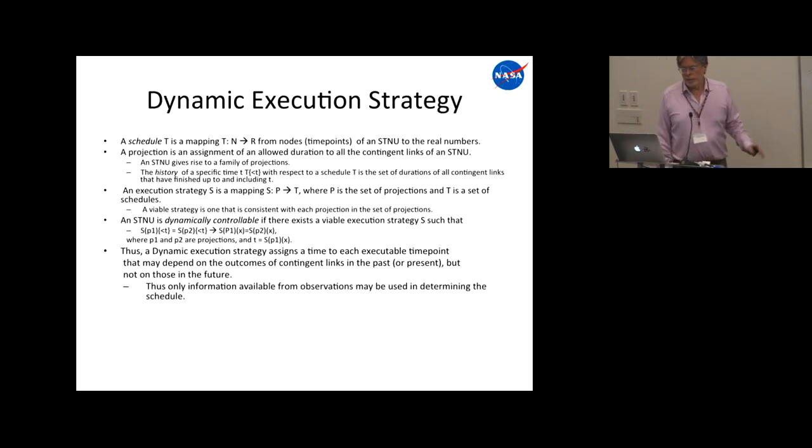Now this is the same idea formally, and I don't have to go into too much detail here, but let's just define what we mean by a number of things. A schedule is a mapping from time points to the real numbers. Okay, so that's a schedule. You're assigning numbers to time points. A projection is an assignment of an allowed duration to all the contingent links of an STNU. So imagine that you take the STNU and you assign single values to all the contingent links. Okay, that's a projection. And it turns out that that projection is a simple temporal network, right? Because the time is fixed, so it doesn't matter.